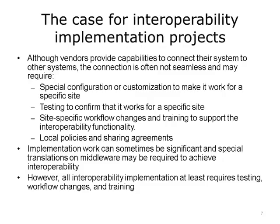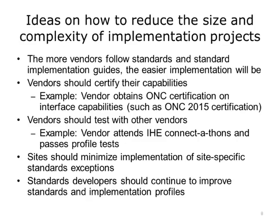Implementation work can sometimes be significant, and special translations or middleware may be required to achieve interoperability. Work will be minimized if vendors have implemented robust standards and implementation guides and have already tested with many other vendors, and if the implementation site is comfortable with their vendors' standard offerings. However, all interoperability implementation at least requires testing, workflow changes, and training. There are ways to reduce the size and complexity of implementation projects.